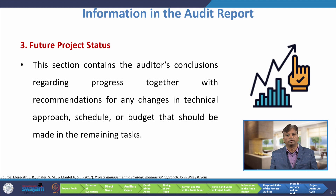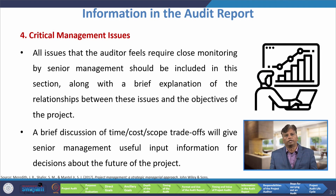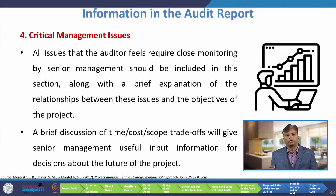The next thing expected from the project audit report is future project status. This section contains the auditor's conclusions regarding progress together with recommendations for any changes in technical approach, schedule, or budget that should be made in the remaining tasks. The fourth thing expected from the audit report is critical management issues — all issues that the auditor feels require close monitoring by senior management should be included in this section, along with a brief explanation of the relationship between these issues and the objectives of the project. A brief discussion of time, cost, and scope trade-offs will give senior management useful input for decisions about the future of the project.